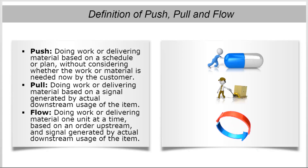Your measure of success in a push environment is schedule adherence for your department. Whether the product actually gets finished or not is not your problem. When work or materials are being pulled, you can't actually move the work or material forward until there is a signal to do so, like an empty space, an empty container, or a physical card.